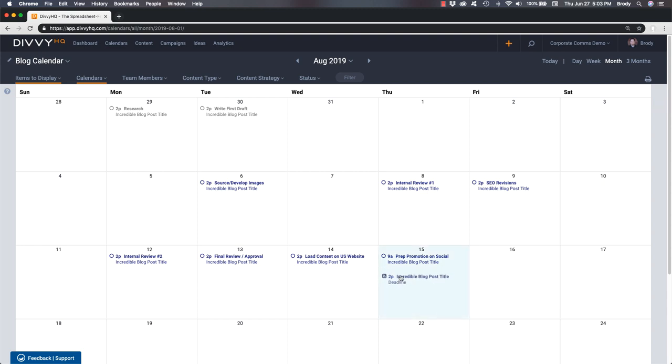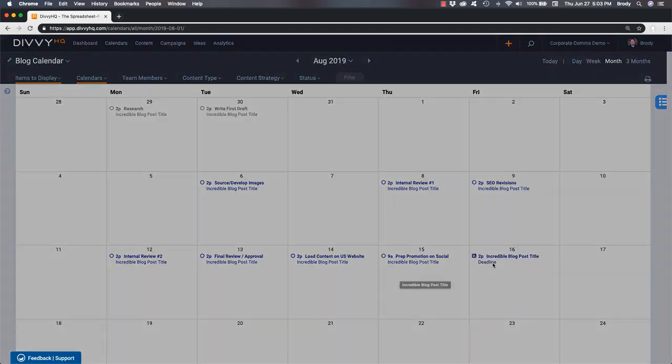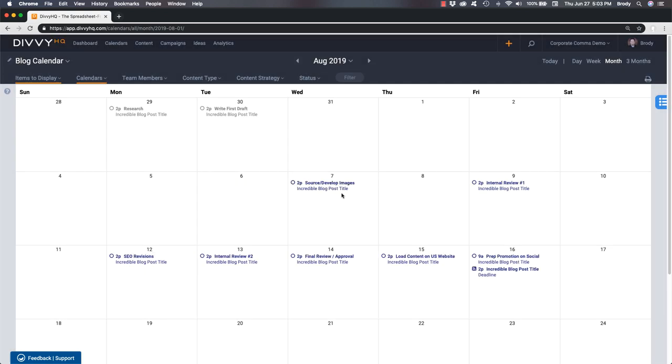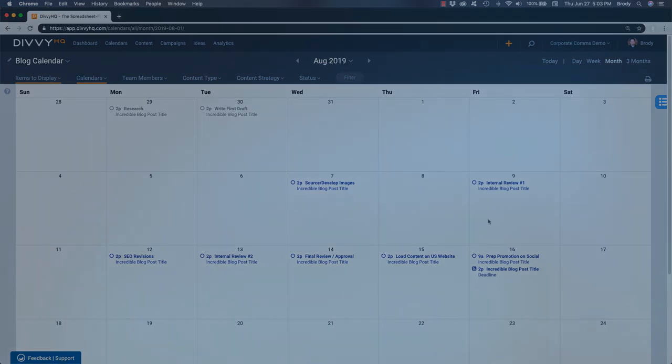When a deadline needs to change on your calendar, a simple drag and drop prompts a confirmation to recalculate the project's task deadlines based on the new content deadline. If you confirm, a new production schedule is set and team members are notified automatically.